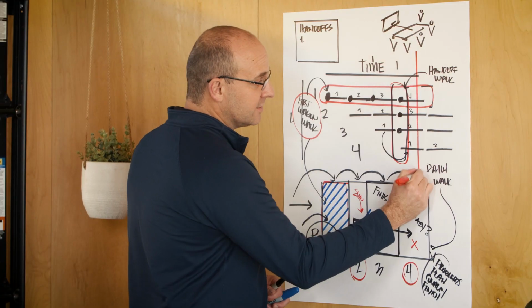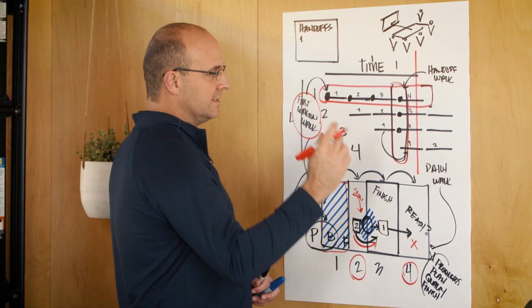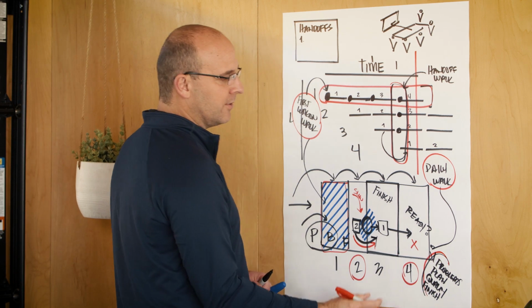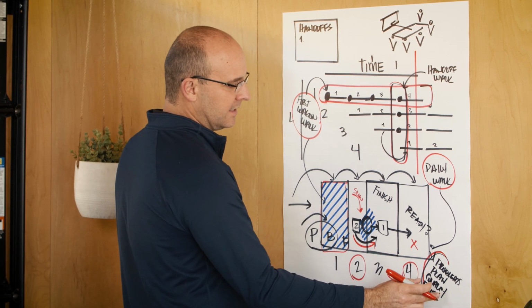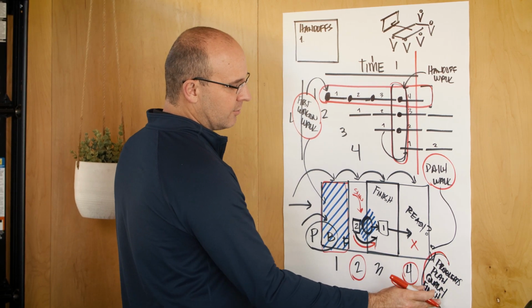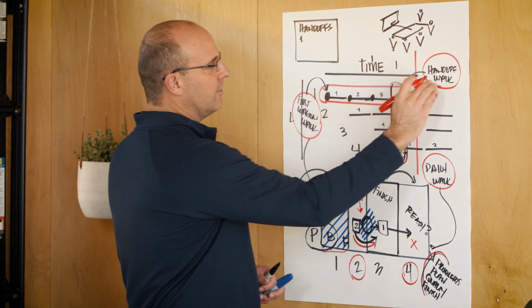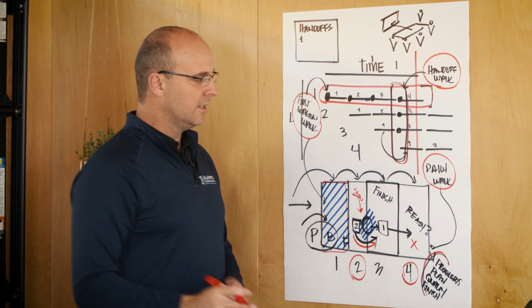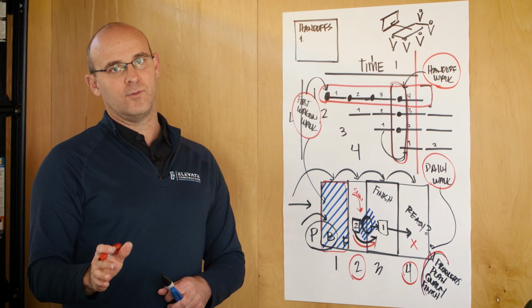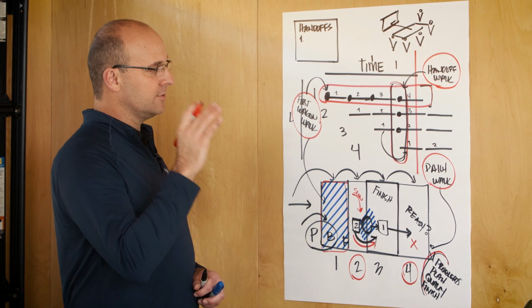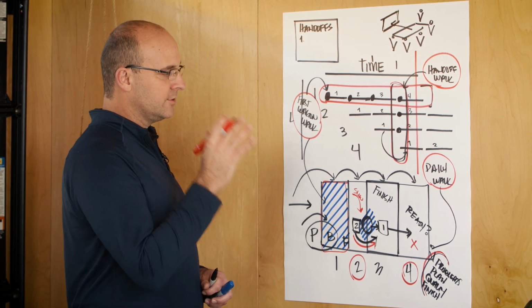And then if you ever have just a slice through the schedule, a daily walk, you'll go ahead and have the conversation with your trade partners to address their problems, plan ahead, and make sure they're installing with quality and finishing as they go. So these 3, your first wagon walk, your handoff walks, and your daily walks, will allow you to not get overwhelmed and have to manage the entire site, but really enable you to just focus on where you should be that day.